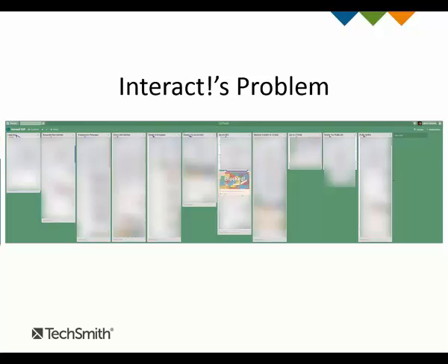I did get lucky though because there was a retro my second week at TechSmith for my team, and I volunteered to head up the Trello working group that was spinning back up after I started. And we made several improvements to the board, including adding a blocked member instead of having the cards that you see there that just say blocked and having to manually pull the cards that are blocked underneath them. We had a script written that if you added the blocked member, it would automatically pull the card to the bottom of the column that it was in so that we didn't have to consistently do manual labor to keep the board in the state that is actually truthful.